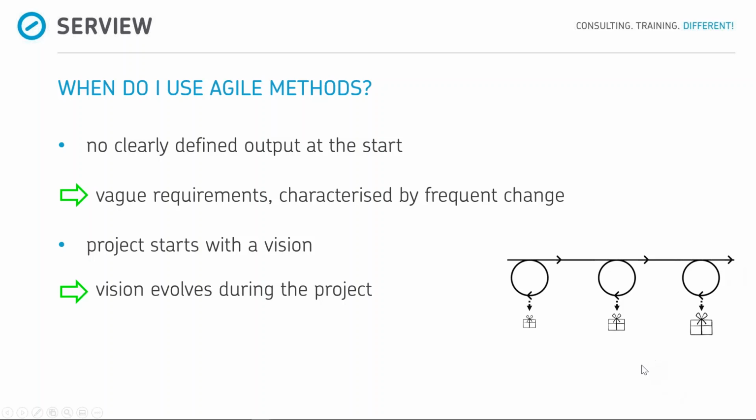So quick reference here. It is, of course, very important in an agile method because it is defined by very high levels of flexibility to be able to meet ever-changing requirements and environments, that we always try to keep the big picture in mind. So we need more guidance towards the big picture in agile methods, otherwise it can go wrong. Another downside is that if you start an agile project, obviously when you make the plan as you go, you can hardly say, well, it's going to cost you this much money and this much time. So this is more of a we will renegotiate as we go as well.